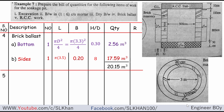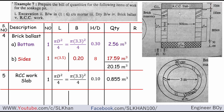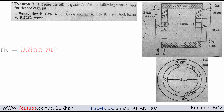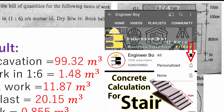Item number five is the RCC work, which is the last item — it is the slab. The area is the same as the brick ballast at the bottom: pi times 3.3 squared divided by 4. The thickness is 10 cm (0.1 m). Multiplying gives the RCC work quantity of 0.855 cubic meters. That's the final result. If you like these types of videos, please hit the subscribe button and press the bell icon so you never miss an update from Engineer Boy.